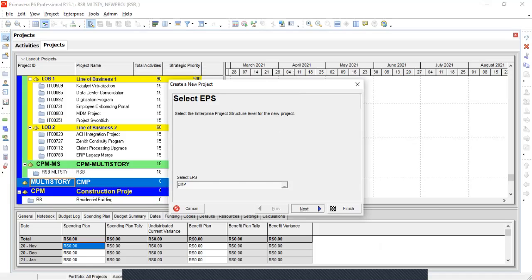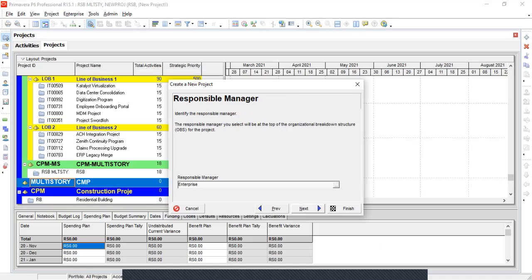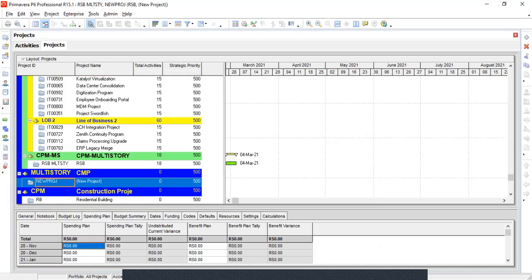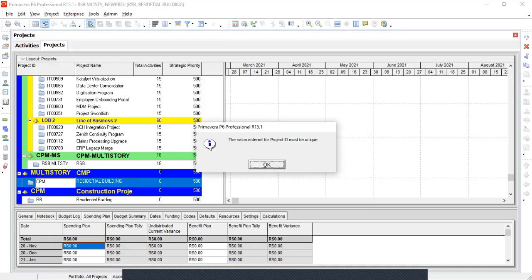As we are doing a building project, we will divide activities into substructure and superstructure activities. So, create WBS for substructure and superstructure options. Click on the icon to view the WBS window as shown. Click on that icon and name the WBS as substructure. Create another WBS and name it as superstructure as shown.